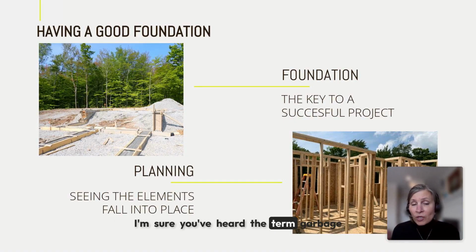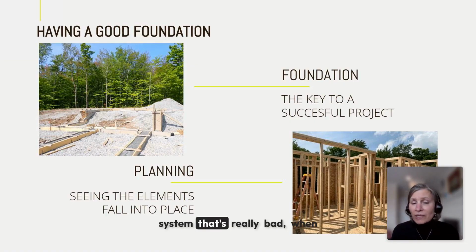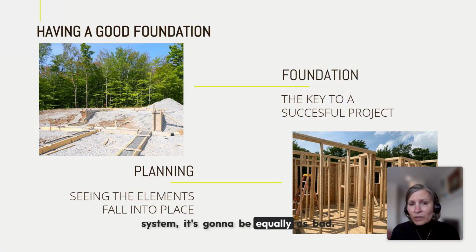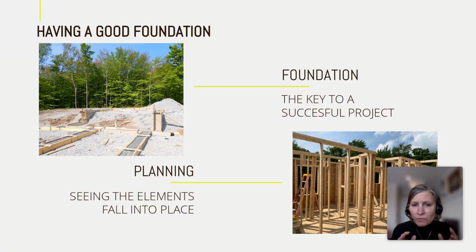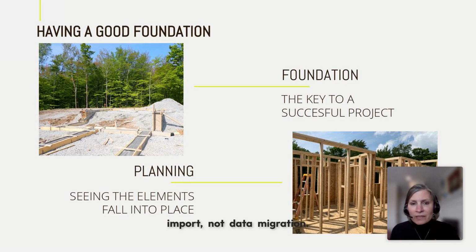The other thing that's super important is data. I'm sure you've heard the term garbage in, garbage out. If you have data in your old system that's really bad, when you bring it into your new system, it's going to be equally as bad. So it's important to allocate time to clean up that data before it gets into the new system. And the other thing is most implementation partners do data import, not data migration. So you will need to have someone who can get your data out of your old system and into the templates for the new system.